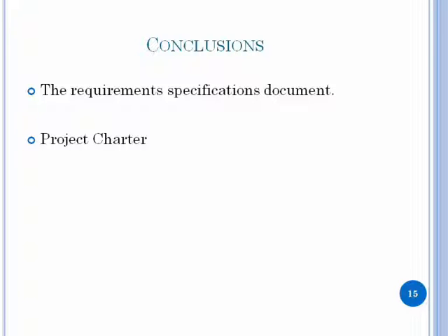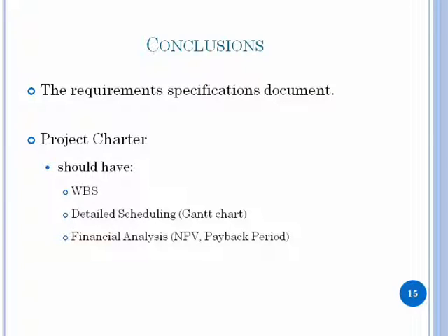We consider it to be a preliminary project charter because a real one should always have a WBS, a work breakdown structure, to capture all the work necessary for the project. A detailed schedule, for example, through a Gantt chart. A financial analysis in which we would calculate the net present value and the payback period we just estimated. And of course sales forecasting, so we can do a correct financial analysis.